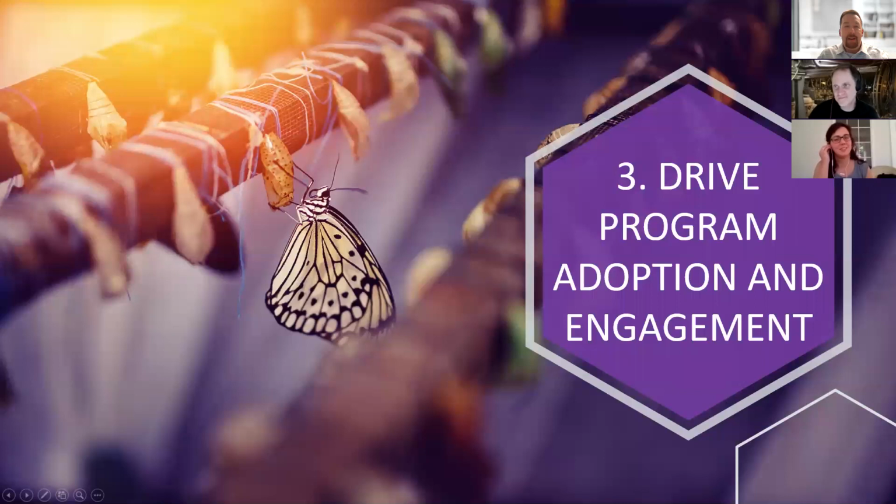So we have made it all the way to element 3. When driving program adoption engagement, remind yourself that organizations don't change, people within organizations change. Change management operates in parallel with project management and focuses on the people aspects of projects with the aim of getting a critical mass of people to commit to the change, learn new behaviors, and willingly sustain those behaviors.